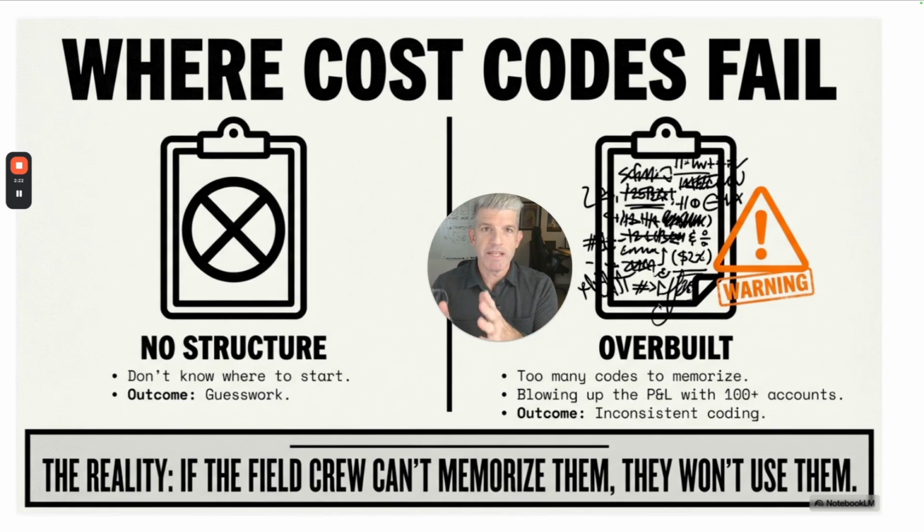The estimating system is one system, which needs to be very detailed. The cost code structure is something that sits behind the estimate. It's tied to the various line items in the estimate, but the cost codes are really the programming language between project management software and your accounting software. It's also the programming language between the field and the office.